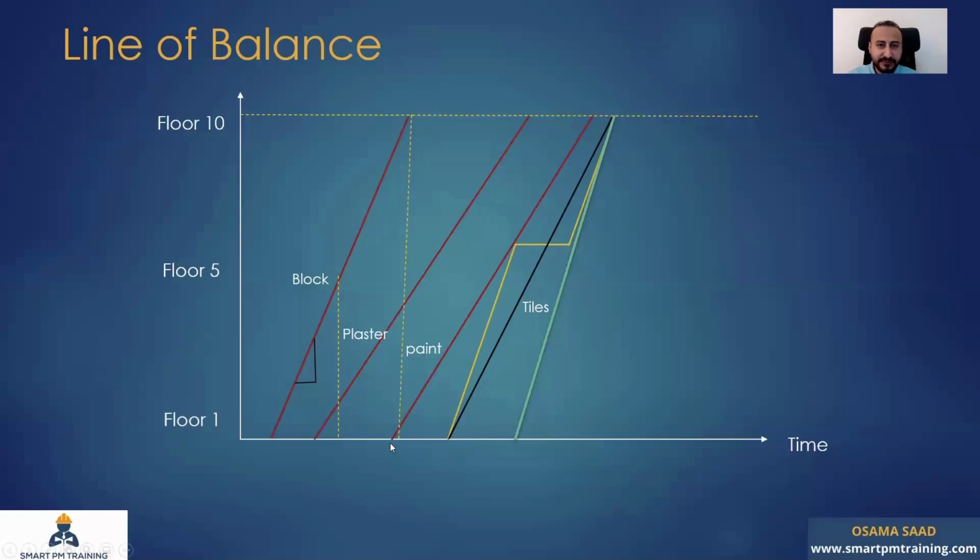So you don't have to stick with a 2 weeks rule here, but be reasonable. If your successors are somewhere within the range of 7 to 12 days, make something similar. So don't take 1 day, for example, for the direct successors. So be really reasonable. You don't have to keep everything at 7 days duration as well. It doesn't have to be the case because we are talking about the same amount of work. So one floor worth of work.